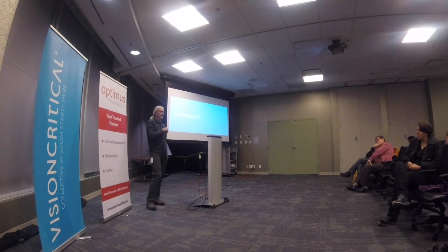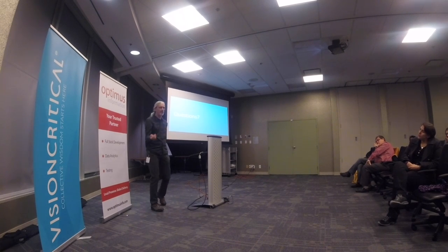I should have elaborated on this a little bit in the process. Someone comes to you with, hey, we have this need, we want this thing, and that starts the process going of now I'm going to have the conversation about the requirements. Once I understand the requirements really well, and we have a gate of you need to have those acceptance tests written and everyone sharing that understanding, then you can move on to the development stage, which is when you start talking about design.